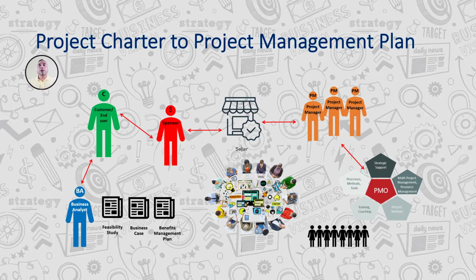Whatever the outcome, as a project manager, I have to deliver the outcome to the stakeholders, that the change request was filed, and I have to update the change log that it was accepted, rejected, or deferred. If it is accepted, we will change the baselines and get the approval. If it is rejected, we'll just inform them. If it is deferred, then we need to resubmit the change request.